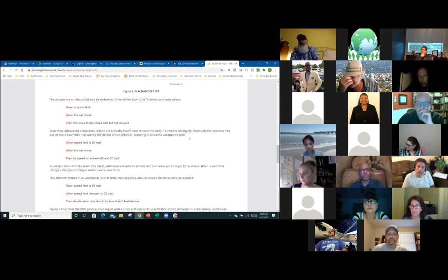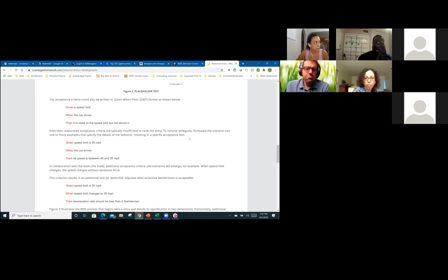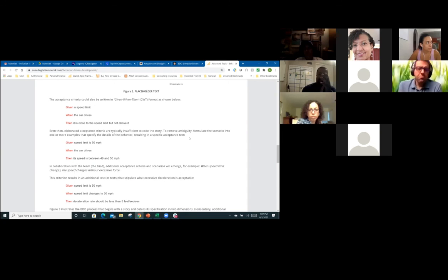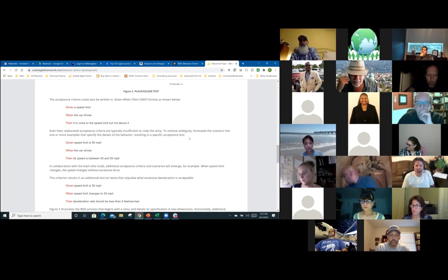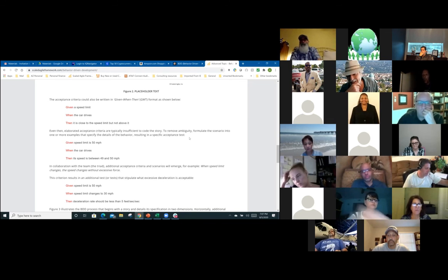I heard somebody today describe the demonstration at the end of the sprint, where the team is demonstrating to the product owner. To me, you should be demonstrating to the stakeholders at the demonstration, because the product owner should have already been involved and already signed off and agreed that you got what they wanted, if you're communicating throughout the sprint.